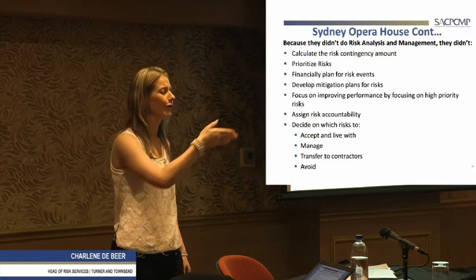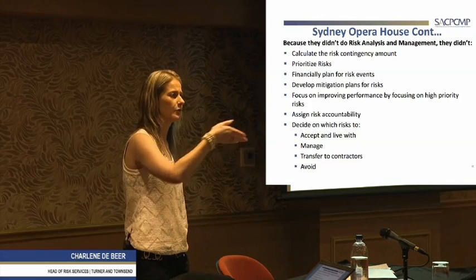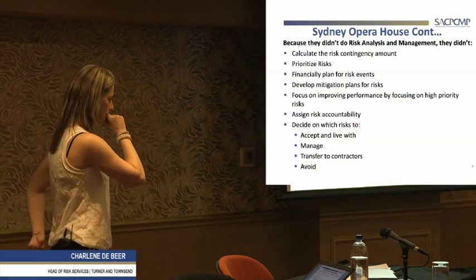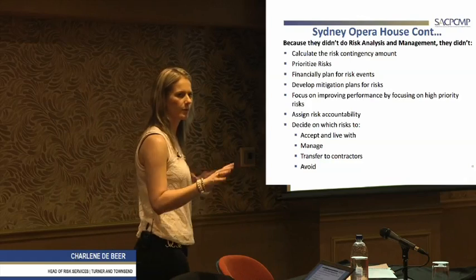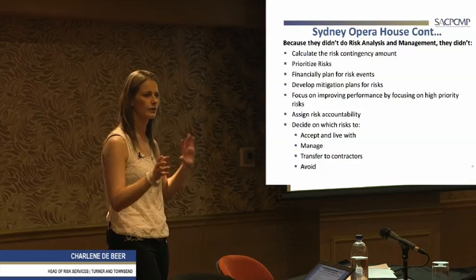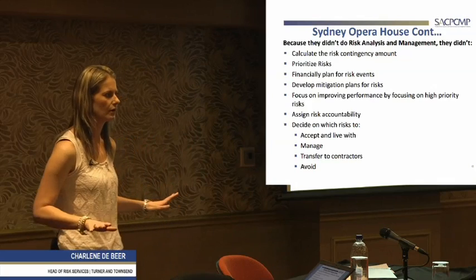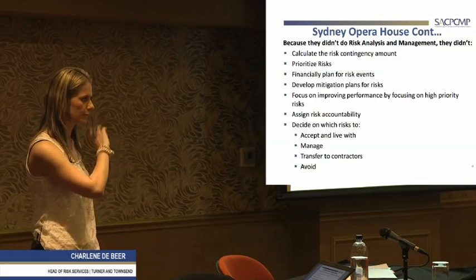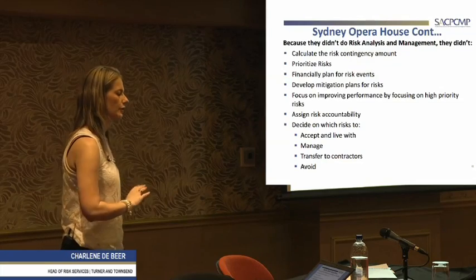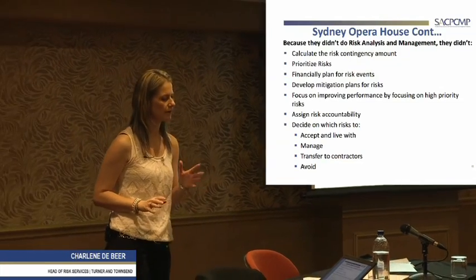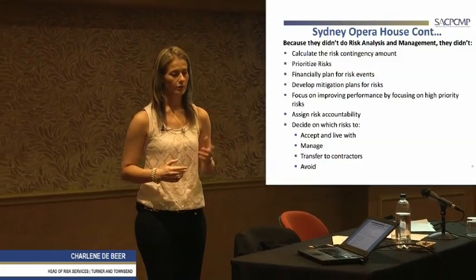And very important, who's going to make the decision at that point in time and who's the risk owner and who's going to deal with it. Because we don't want to run around at the last moment thinking, oh, who's going to look at it and who's going to do what. We need to know everything before it happens. Because if it happens, it's no longer the risk. It's an issue. It's materialized. You're going to have an impact. The scary thing is you don't always know to what extent.